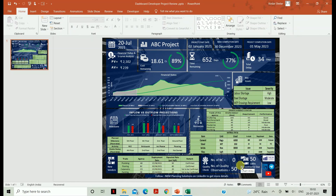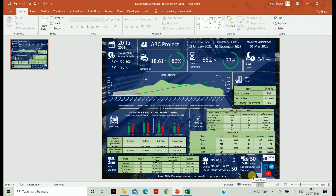For each vendor, you will find their deployment date, expected rate, and remarks — whether confirmed or yet to be confirmed. Besides that, you will find quality-related data: the number of quality checks, the number of NCs (non-conformances), the number of quality observations on your project, and the pending payments of the subcontractors.